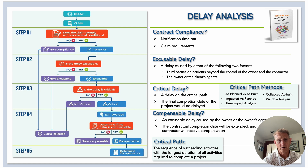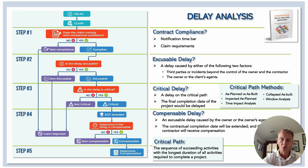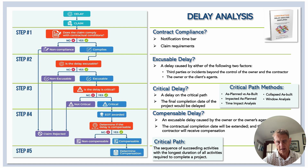If we establish that the project was indeed delayed, we move on to step four — determining whether the delay is compensable. The contract would give guidance, but generally in the industry, excusable delay caused by the owner or the owner's agents would qualify for compensation. In this case, in addition to compensation, the contract completion time would be extended, and the final step would be to determine the specific compensation — again guided by the contract or billing documents.